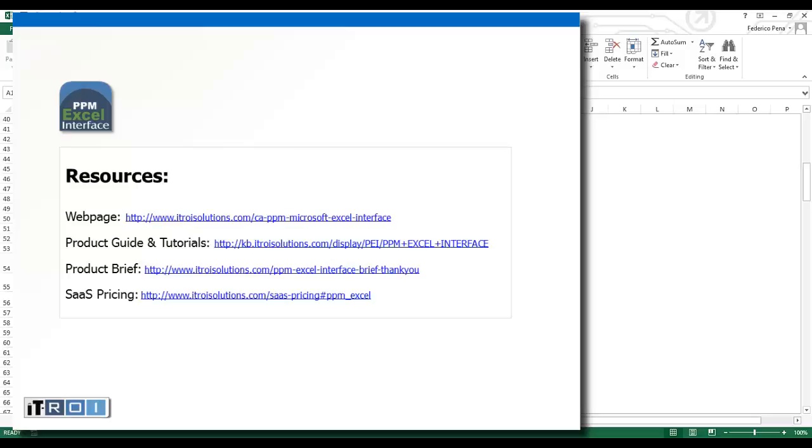What we've done is we've covered the most common use cases, and that's what we include out of the box, right? But it's very rare that we roll out the Excel interface to somebody without some type of additional configuration that they're looking for. Federico, the question was, is this FTE or hours? In that particular case, it was FTEs, and for monthly, it doesn't really make sense to do hours, strictly because there are no 2 months that have the same number of working hours. So the most common scenario is FTE.